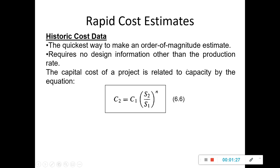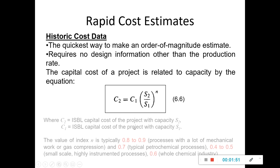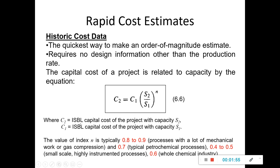Under rapid cost estimation, we can use historic cost data. This is the quickest way to make an order of magnitude estimate, which requires no design information at all. What we need is only the production rates, and then the capital cost of a project is related to these equations. C2 here is the capital cost of the project with capacity S2.